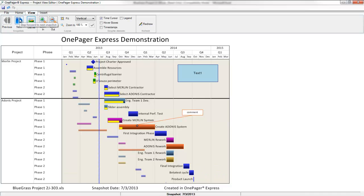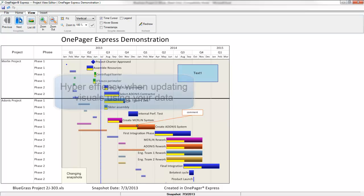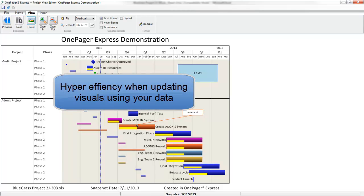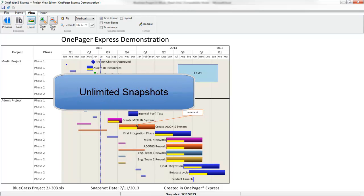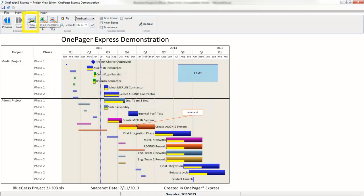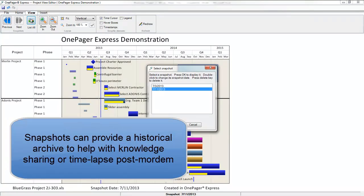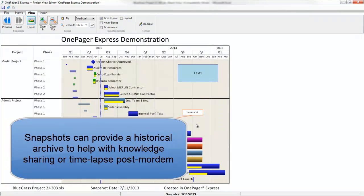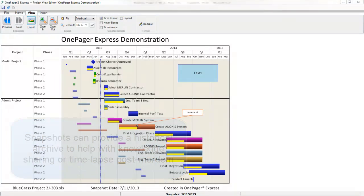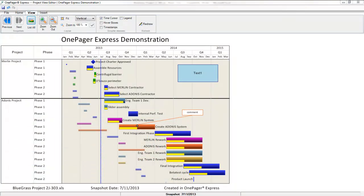I can have as many snapshots as I want, and those will all be available to me by clicking the list all button. This capability is very valuable for CYA purposes or if your company likes to apply lessons learned from previous initiatives toward future projects, since you will have a cataloged history for how the plan evolved over time within your snapshots. Much of this content in the view can be snapshot-specific, such as comment boxes, text boxes, images, and curtains.